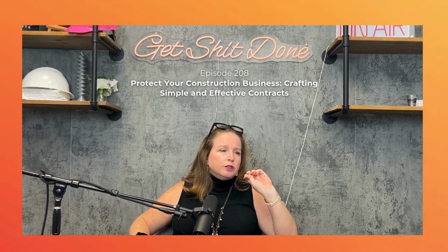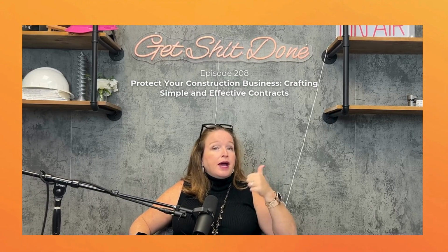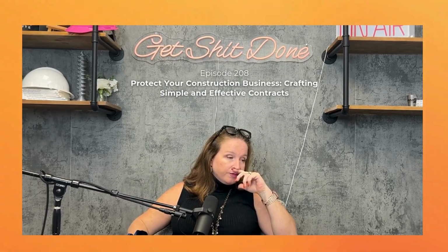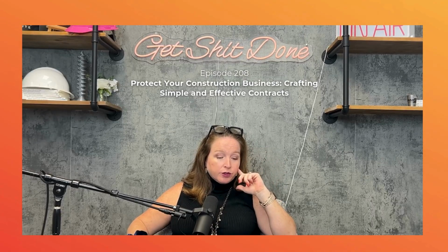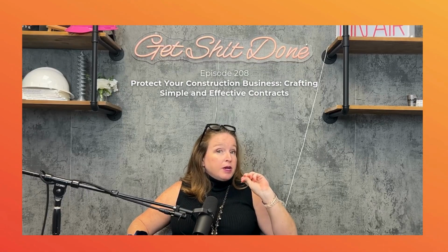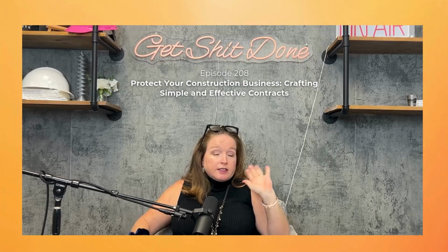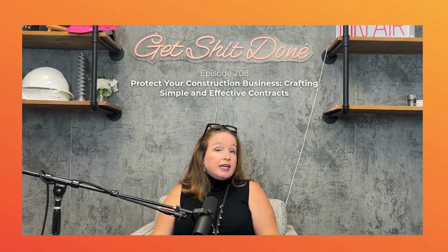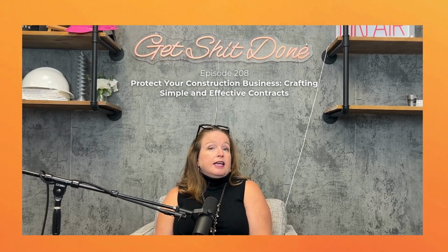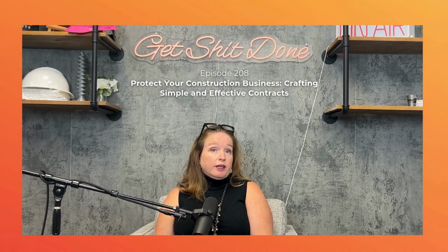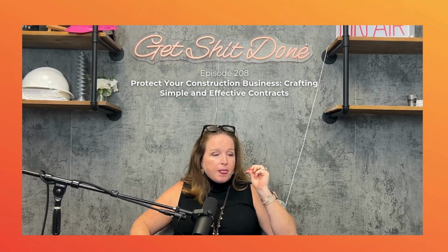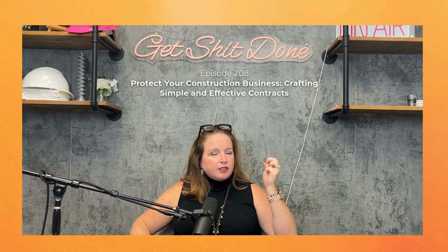Another thing in the commercial world when it comes to change orders are back charges, AKA deductive change orders. This happens quite frequently in the commercial construction industry. Normally, when you get close to the end of the project, they are trying to make money back, and so they're going to try to charge you for things. Some may be valid, some might not be, right? Like if you broke a window, or if you did something wrong or scratched paint, then that would be a proper deductive change order, right? If you don't pay to fix it and they have to pay to fix it, then they're going to issue a deductive change order for the price. But not every deductive change order I've seen is valid.